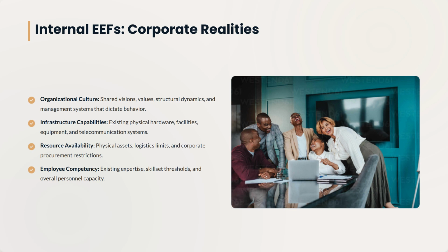Example, imagine you are a project manager tasked with deploying a machine learning tool. If your company's culture is highly risk averse and your team's skills are limited to traditional databases, these are internal EEFs. You must immediately factor in extra time to train your employees and budget for culture building workshops to get buy in.